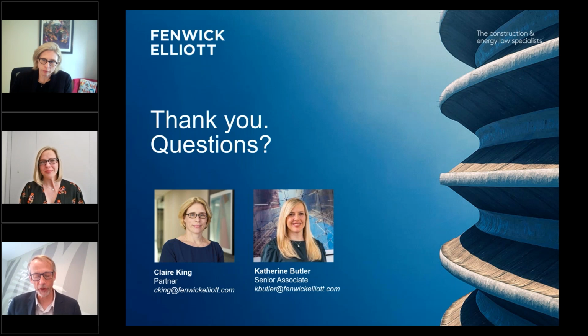We're just coming to a close. I should say we've had a question about highlighting briefly the final account procedures under the FIDIC Red Book, and that might actually be a topic for another webinar. But just incredibly briefly, a couple of things about FIDIC. The FIDIC form itself doesn't have payment notices and pay less notices, which is something to think about if you're operating a FIDIC contract in the UK, because you would then become subject to those notices under the Housing Grants Act.